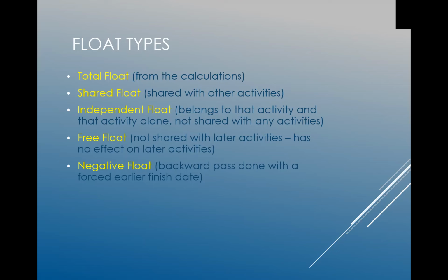Sorry, guys. So anyway, you have shared float, and that's shared with other activities. So you may have two activities that are actually overlapped and they share some of that float. Independent float belongs to that activity and that activity alone, not shared with other activities. An example of this may be, you may have 5 days scheduled for your framer.